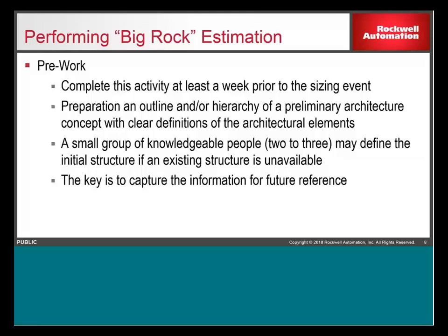doing the estimates. This really should be done at least a week prior to the sizing event. I've had a number of cases where folks are very interested to get a preview of what is the breakdown coming from the architectural elements, or what are the things that we're going to have to think about prior to going into this estimation session. It also allows team members to prepare some early questions, or to ask the questions so that they have the answers as they get into the estimation session.